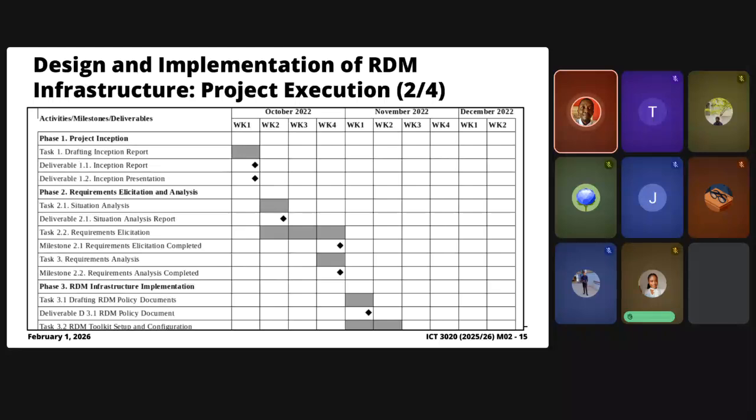What's perhaps important here, if you look at this artifact, is the fact that there are diamond symbols here. These indicate deliverables and milestones, right? They are supposed to be distinguished from your normal task, which is this shaded, grayed out rectangle here. There are a couple of other things that are missing here, but we'll get to that at a later stage. Like, for instance, the dependencies, right? You can't immediately notice which tasks are dependent on which existing tasks, for instance.